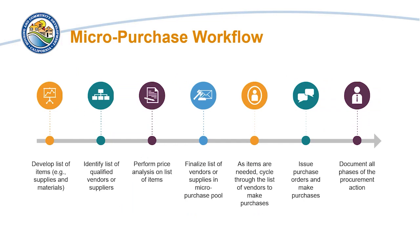The following workflow depicts the timeline of key events for micropurchases. First, develop a list of supplies and materials that need to be procured and identify a list of qualified vendors or suppliers to be used. Next, perform a price analysis on the selected list of items and, based on the results, finalize the list of vendors or suppliers that will become the micropurchase pool for future purchases. As items are needed, cycle through the list of vendors to make purchases and issue purchase orders. Last but not least, document all phases of each procurement action.